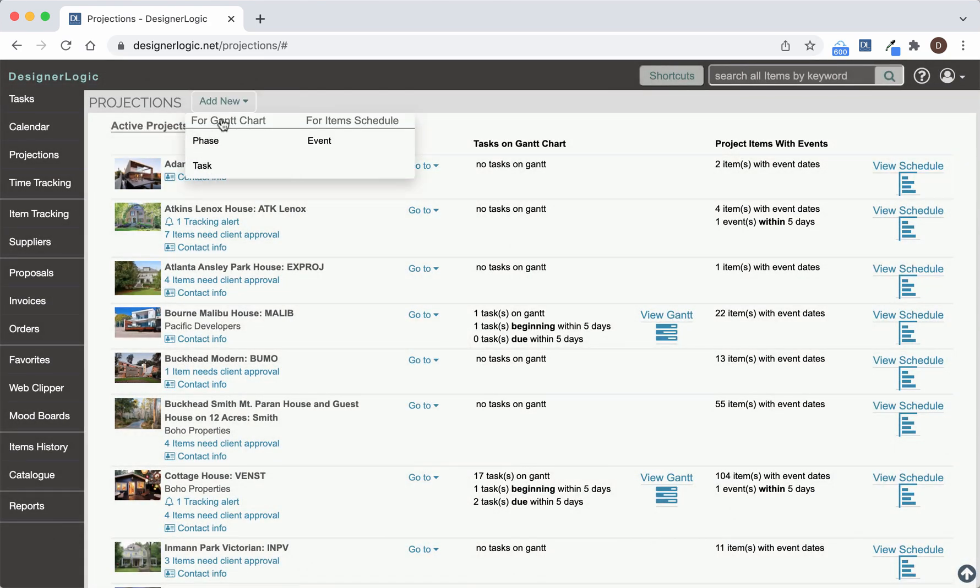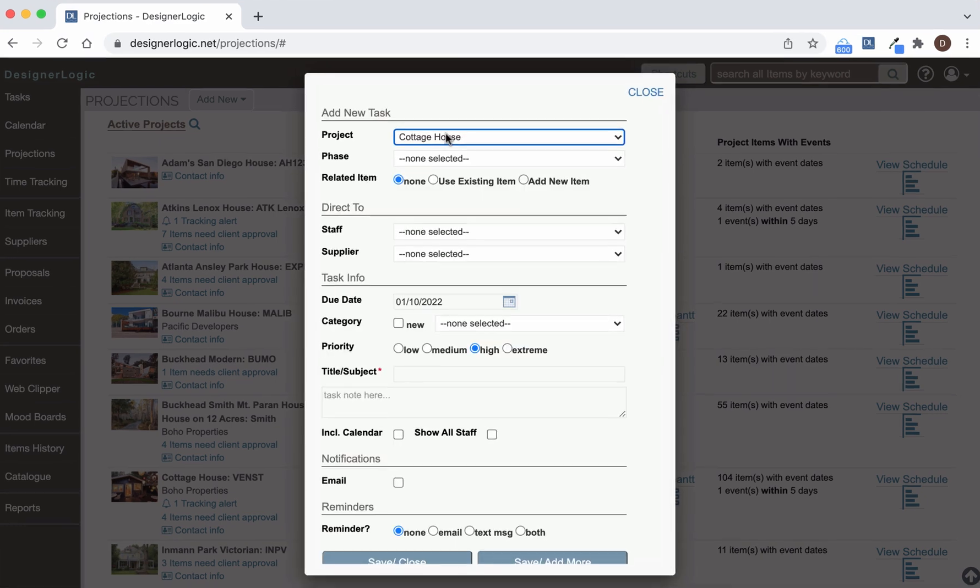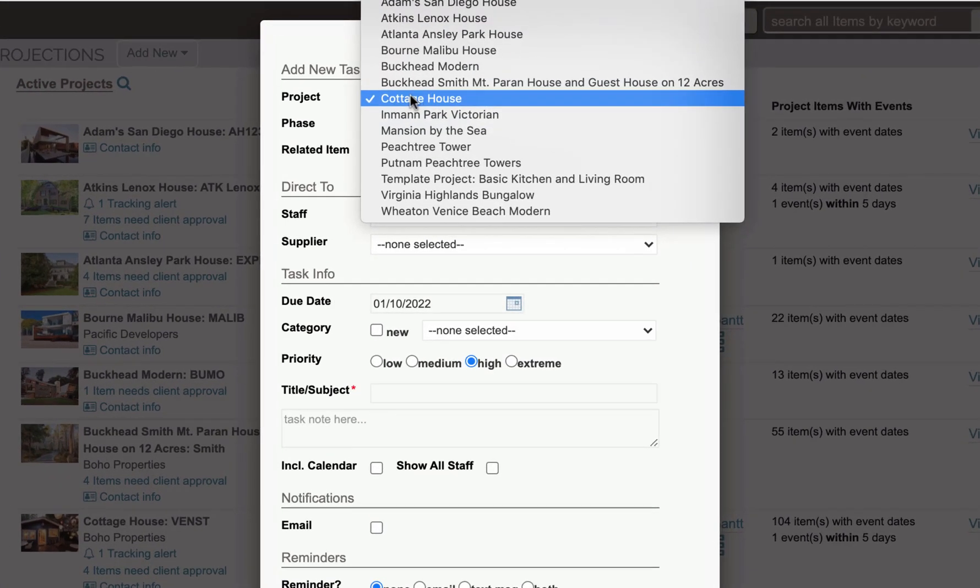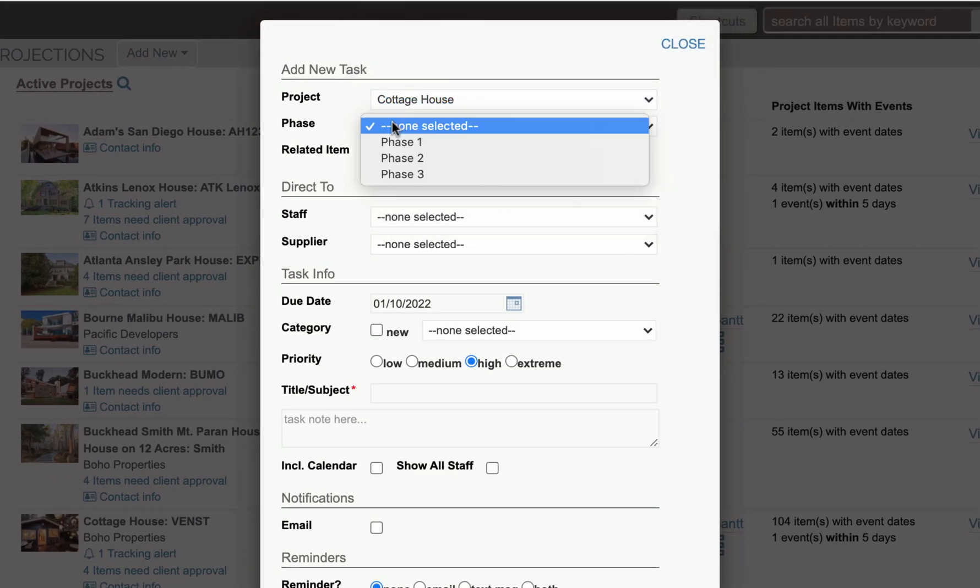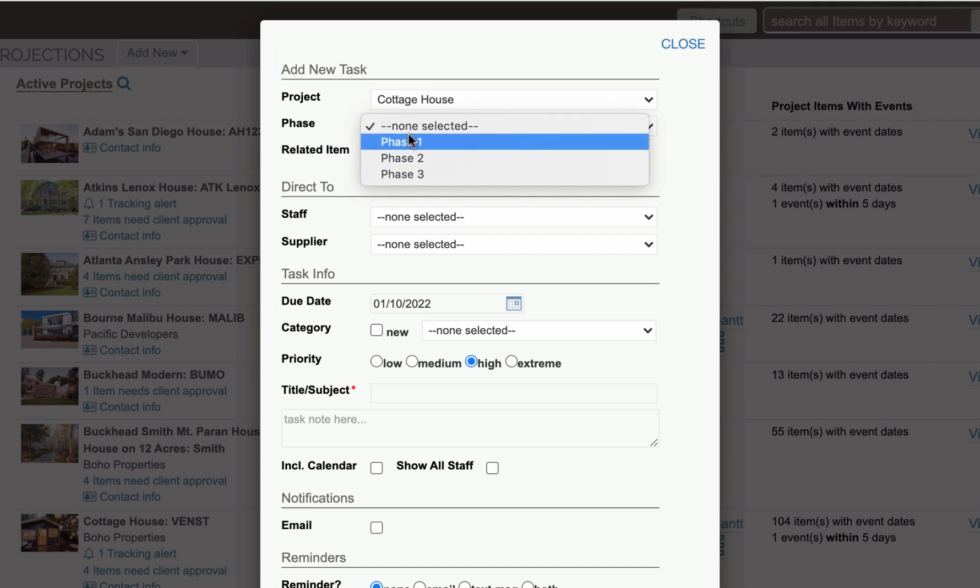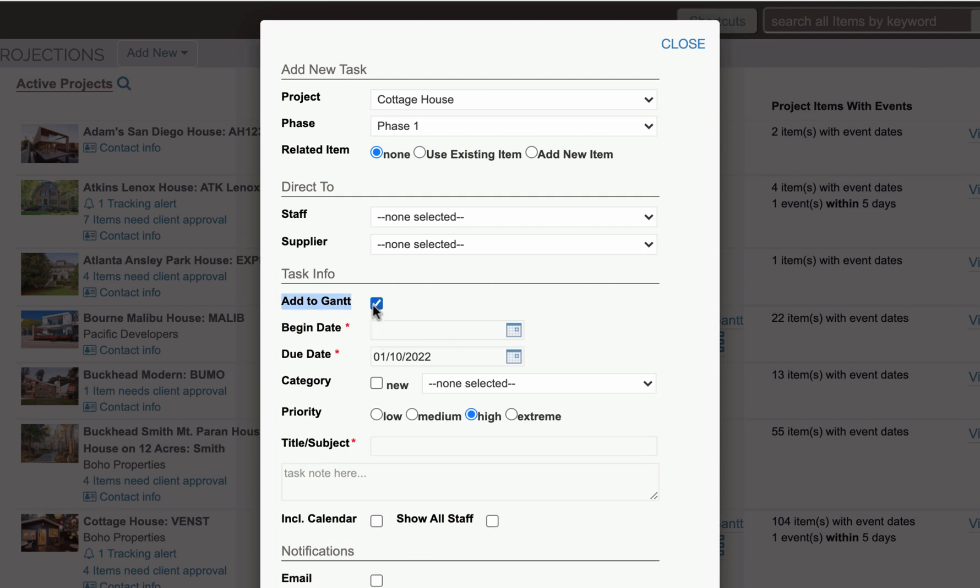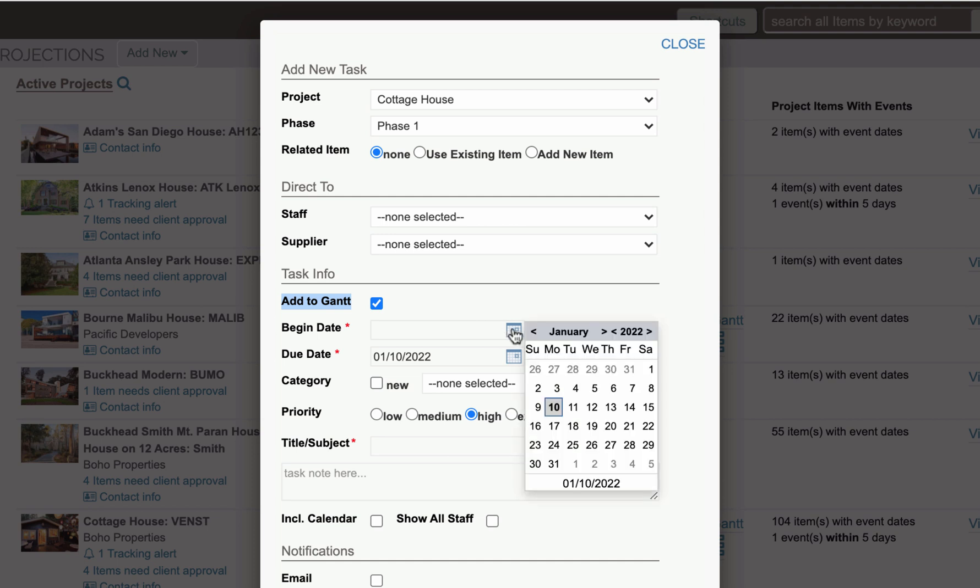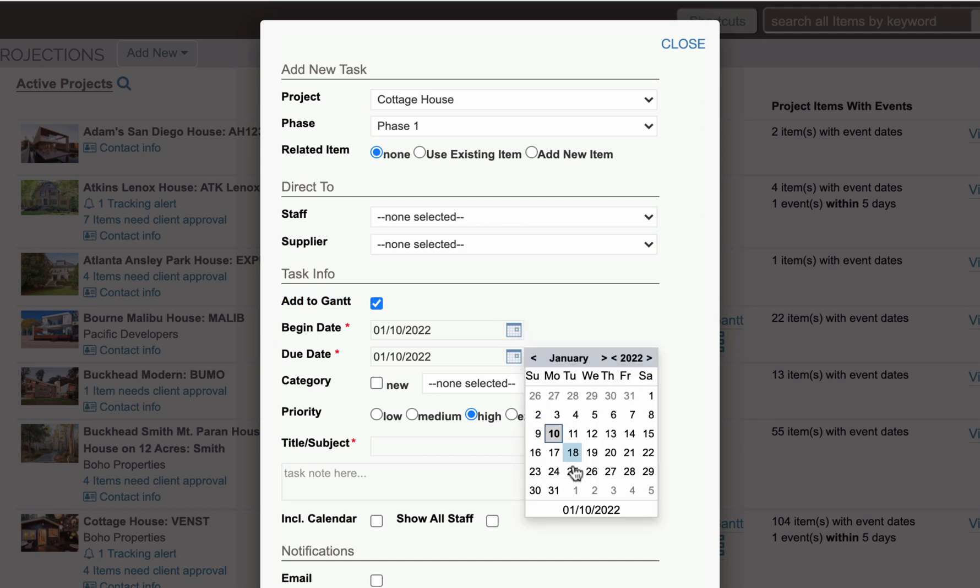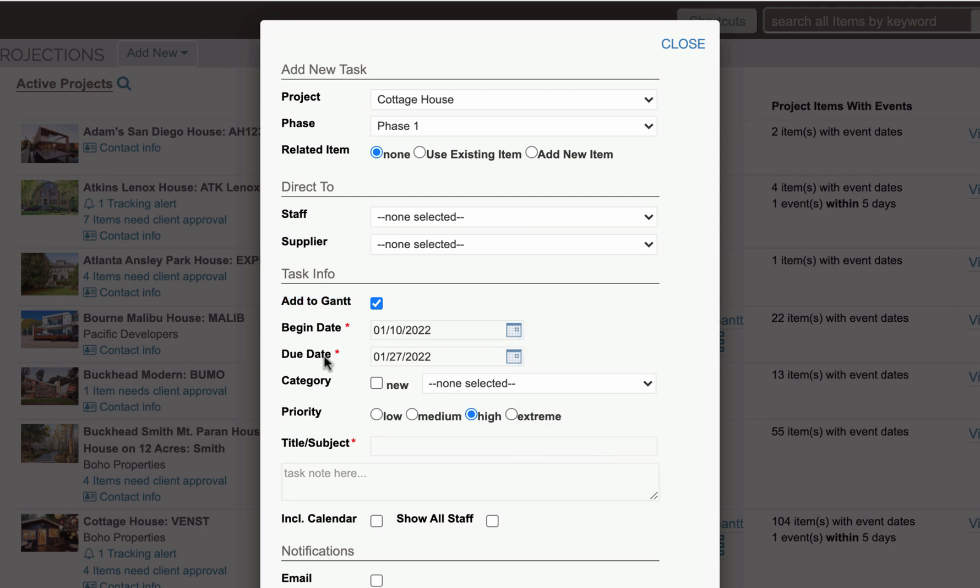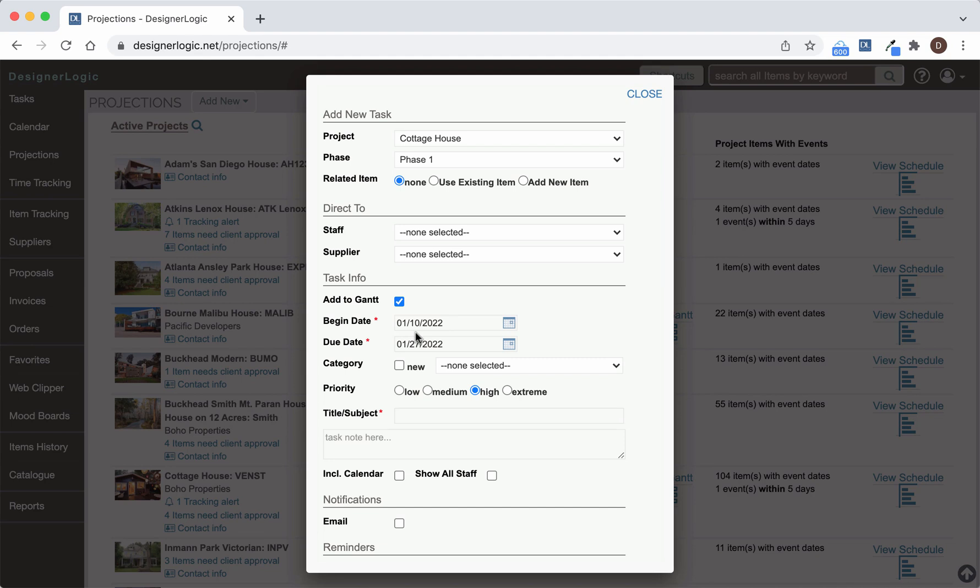And here you want to choose the project you want to add that task to. And down here, if it has a phase, you want to select the phase it goes on. And then down here, once you have the phase selected, you're going to have this Add to Gantt option here. So you can say, I want to add it to the Gantt chart. And then you want to make sure that you put in a Begin Date and you want to make sure you put in an End Date or a Due Date as well. It has to have a Begin and a Due Date. And those three things right here will put this automatically on that Gantt chart.